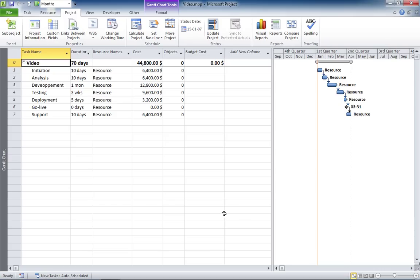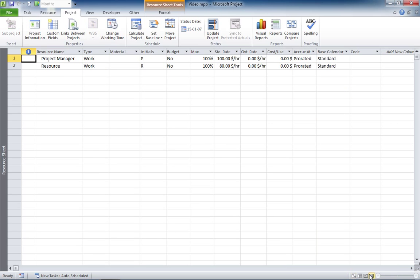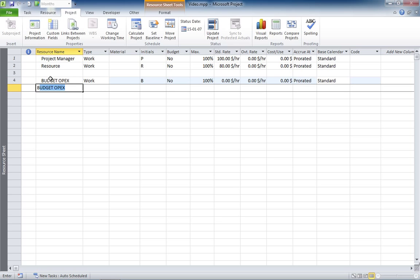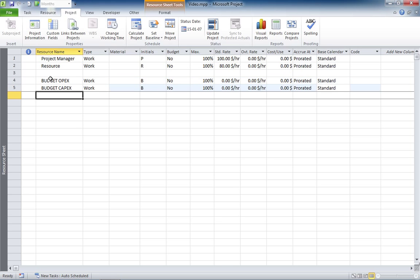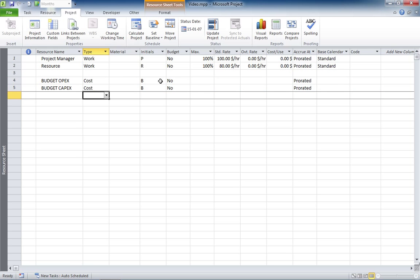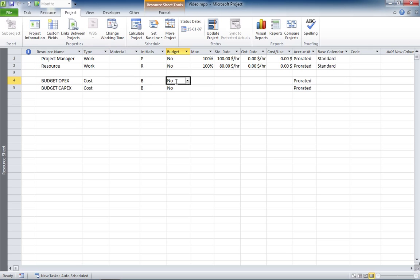The first thing you need to do is to go to the resource sheet and create your two budget resources. Here you go. Now, you need to declare them as cost resources and make sure that the project understands that they are budget resources.